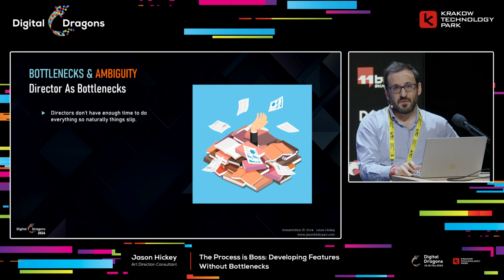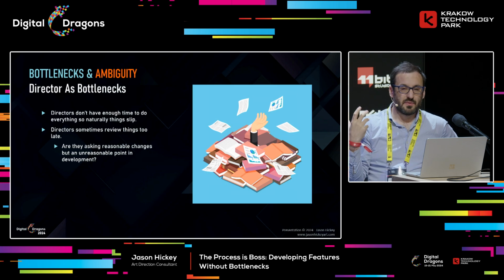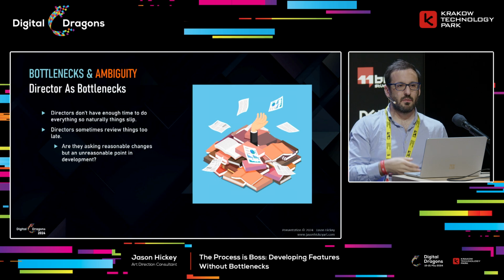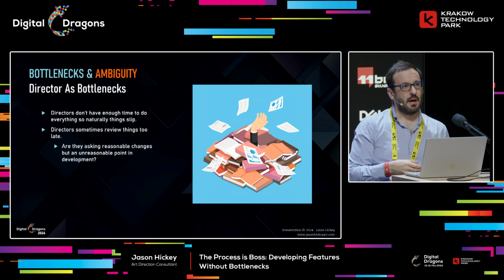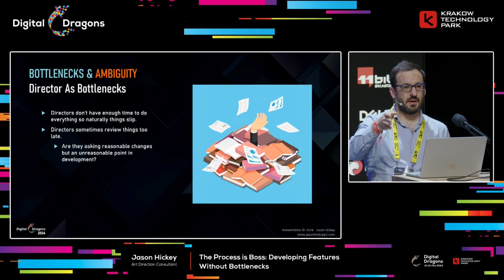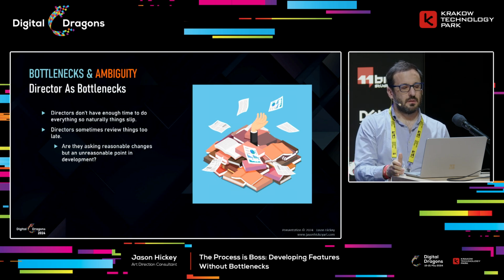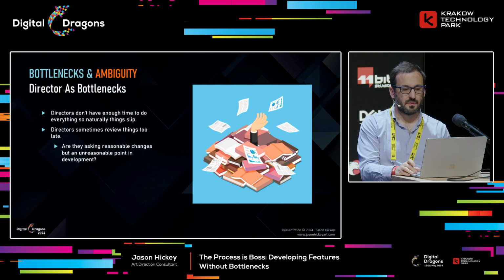So directors don't have enough time because there's just too much stuff to do, right? What that could manifest in is that they're reviewing something too late. So for example, it's alpha, everyone's raring to go, and the director comes in and goes, I haven't seen this level yet. I want to remove that 10-minute traversal section from the game. And it's like, well, that would have been great if you'd said that in pre-pro or in early production. So they might be asking for something reasonable, but it's just too late in development.